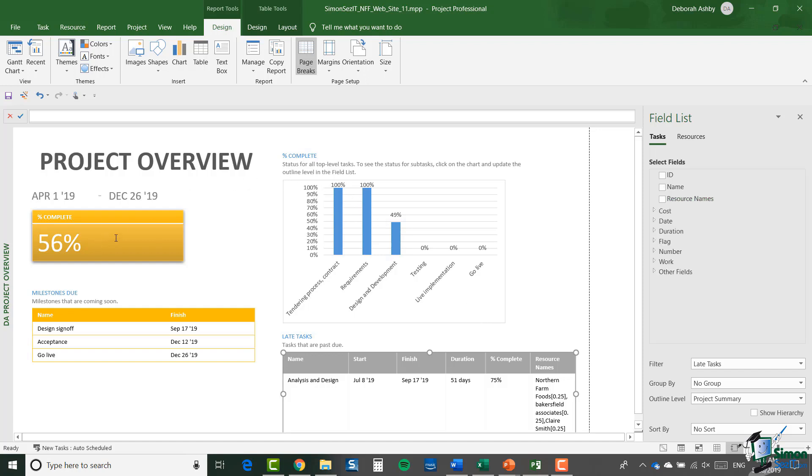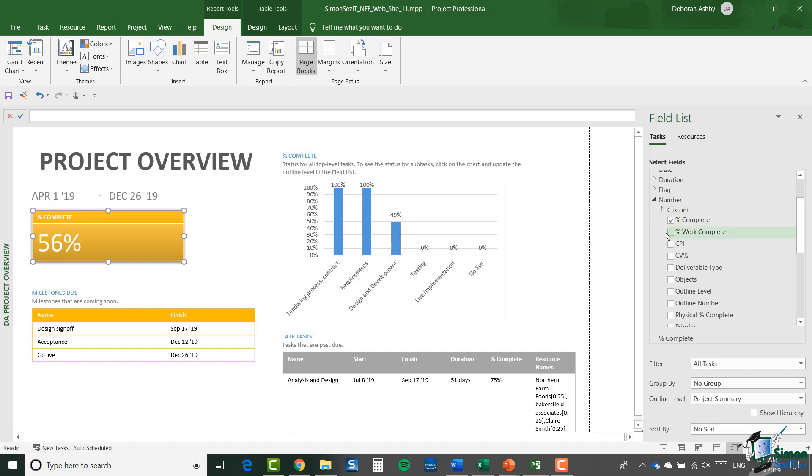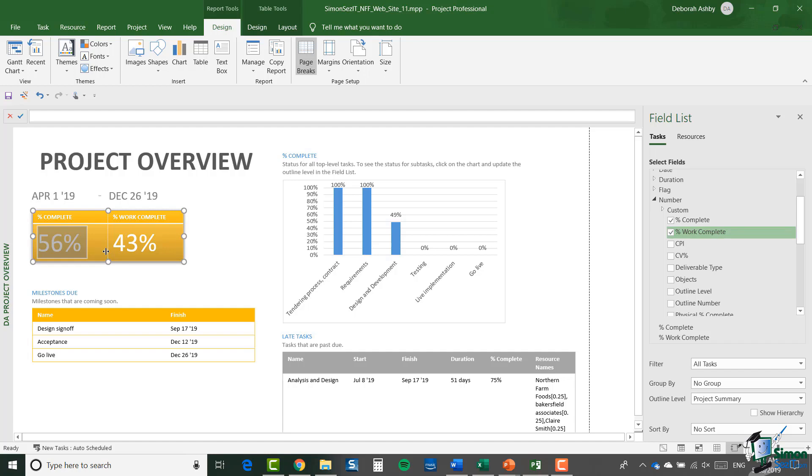Now working on that principle, if I went back to the table that contains the percentage complete and decided that what I really want to show in my project overview is not just percent complete but also the percentage of work that's complete, because percent complete refers to the amount of time that's complete. So if I go to my field list and scroll down, I have an option here to select percentage of work complete, and that gives me a second column in my table and just makes my project overview a little bit more informative. Looking at these figures, the fact that I've used 56% of the time to do 43% of the work doesn't necessarily mean that I'm behind schedule, because the work may not be evenly distributed over the time, but those two figures together can often deliver quite an important message.